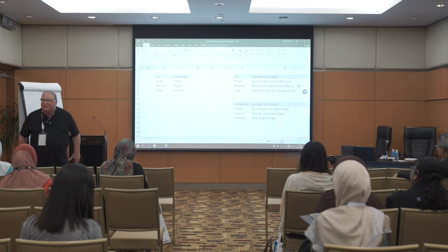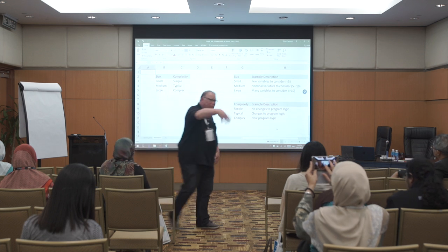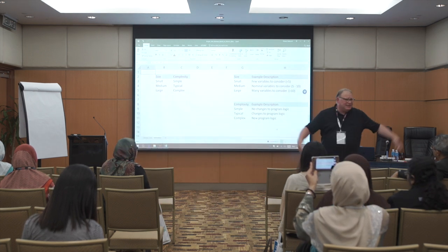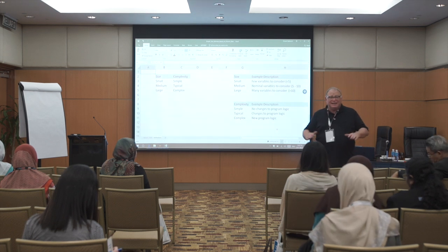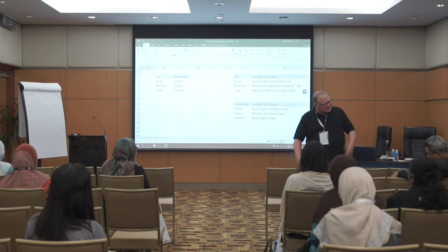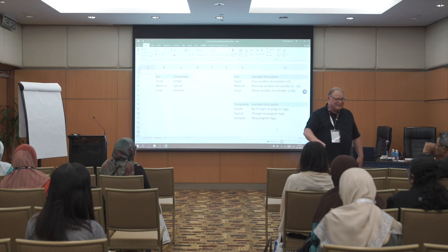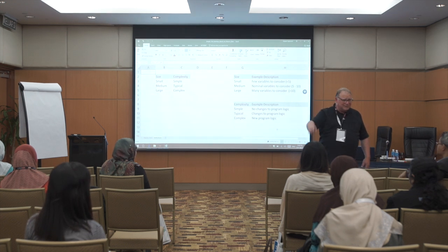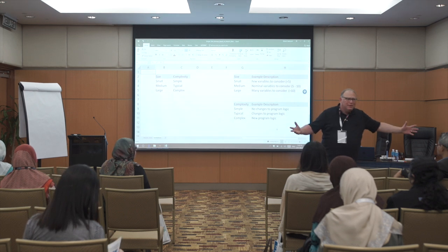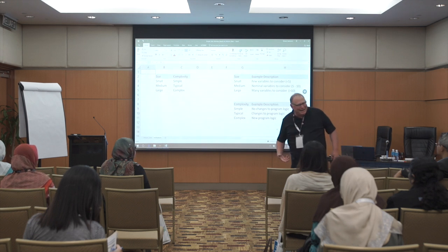Of course, you have to make a scale that meets your culture, your team. A simple scale for size. You pick one, hopefully related to factors for your team. Collect the data, try it for a couple of weeks. It does not take long. After a while, people get very good at it. When they're estimating, they'll say, well, I have 5 test objectives. That breaks down to about 20 tasks. Those are small ones, these are complicated ones. We need to talk to the programmer about the complexity because it varies.